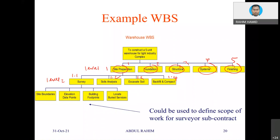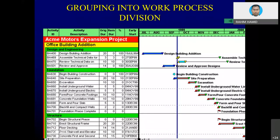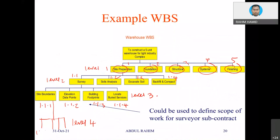This is like chapters and subtopics in a book, or even in your thesis. Level 3 falls under Level 2 — for instance, site boundary falls under survey, so the number would be 1.1.1, then 1.1.2, 1.1.3, 1.1.4. If under site boundary we have further sub-activities, that is Level 4, giving us 1.1.1.1 — that is what WBS is all about.